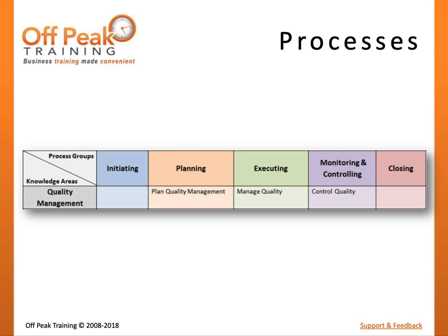The manage quality process will focus on the improvement of project work processes, while the control quality process will emphasize deliverable inspection. The PMBOK Guide defines 49 project management processes, 3 of which are part of project quality management. Project quality management focuses on the product development processes to generate deliverables. These may include an assembly line, a step-by-step procedure, or other guidelines that minimize variations in project work.